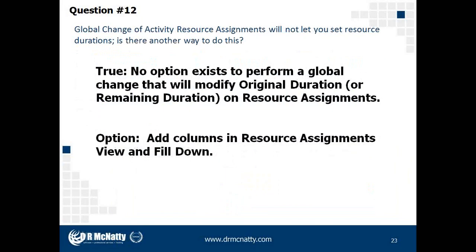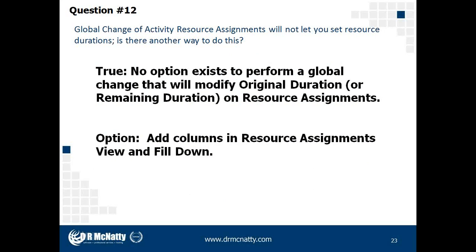Okay, question number 12. Question number 12 asks about a global change. The question is, global change of activity resource assignments will not let you set resource durations. Is there another way to do this? So in looking at this particular item, it is true. When we are looking at the global change options for resource assignments, we do not have the ability to edit or update fields for original duration or remaining duration for those resource assignments.